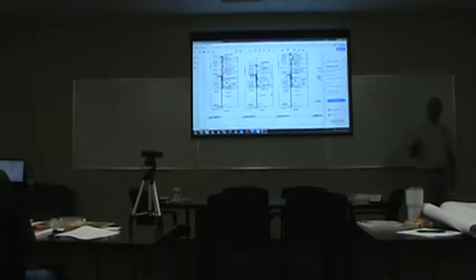Roof blocking and curbing. Roof blocking, you're also going to have some blocking overall where you tie in next to the Publix on this particular thing. We know that 100 and 170 is 340. So we got 340 feet of blocking, okay? I'm just going to put 340 as a quantity. And let's just say for the sake of conversation, that takes 3 days.